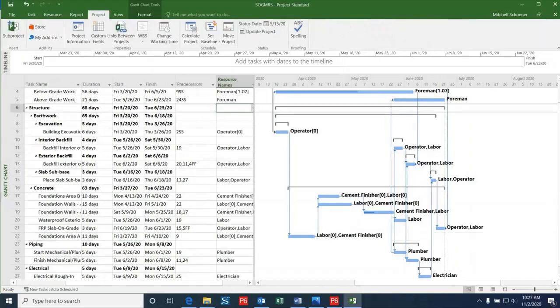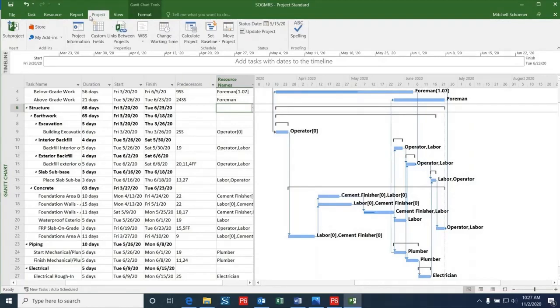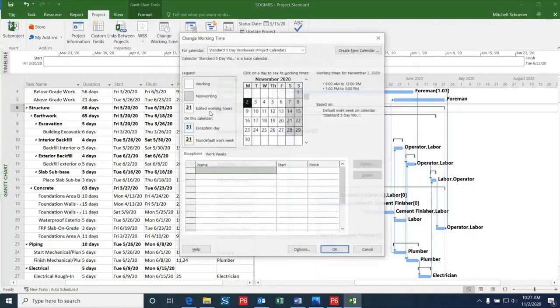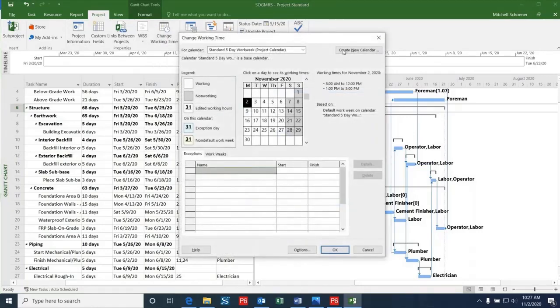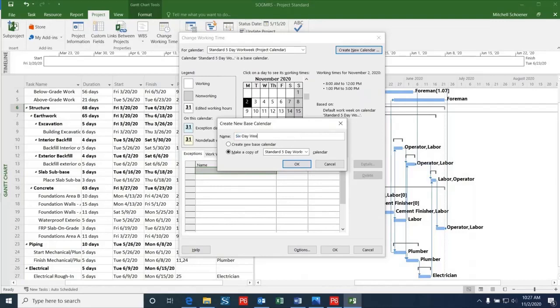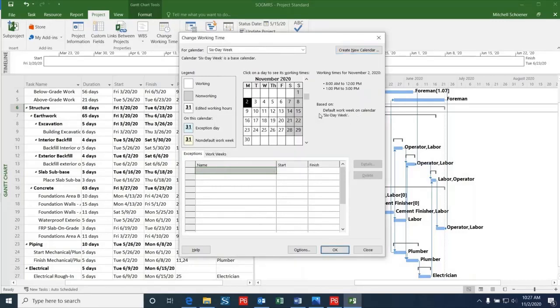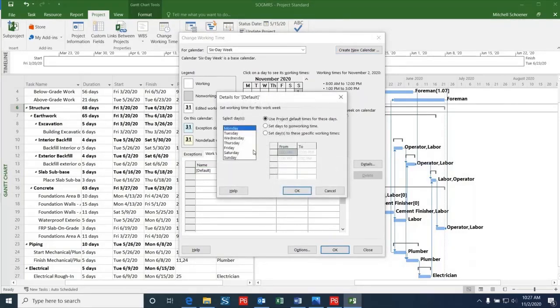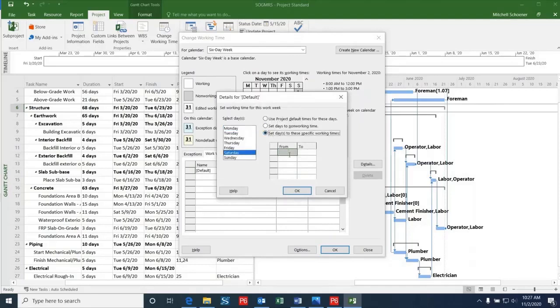In order to solve this problem, I'll create a new calendar within Microsoft Project that I can apply to the schedule in order to get it to line up correctly. In order to do this, I will go up to the Change Working Time under the Project tab and click Create New Calendar. I'll change the name of this calendar to six-day week. I will then double-click on the Start column and select Saturday and then change this option to Set Day to these specific working times.